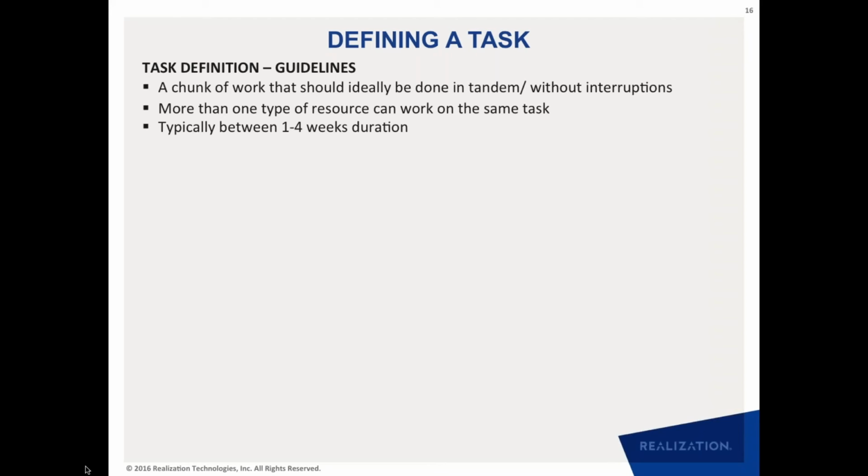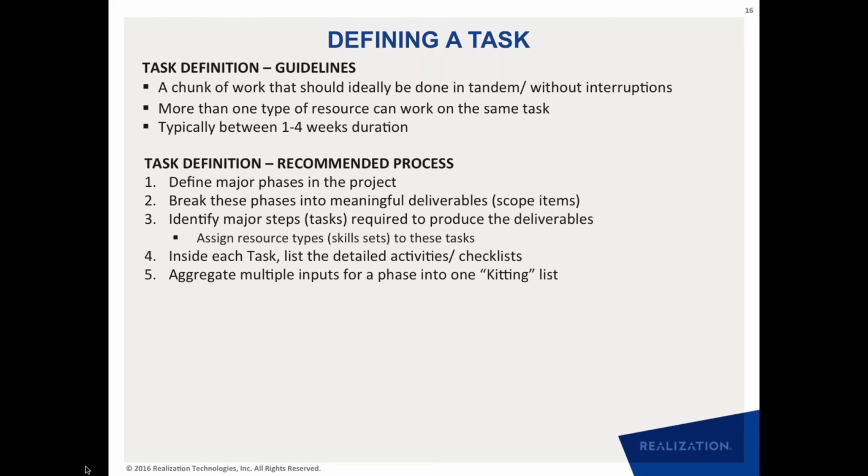And again, more than one type of resource can work on the same task. So a task is not something that is done by an individual or even a skill set. Sometimes multiple skill sets can be on the same task. And the other practical guideline is that typically the task should be between 1 to 4 weeks. Now, sometimes they can be more than 4 weeks, sometimes they can be less than 1 week, but a majority of them should fall into 1 to 4 weeks duration.